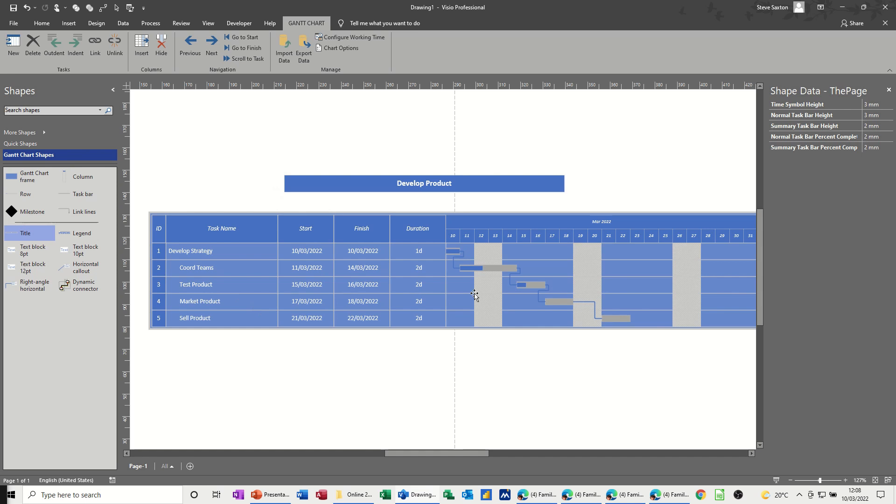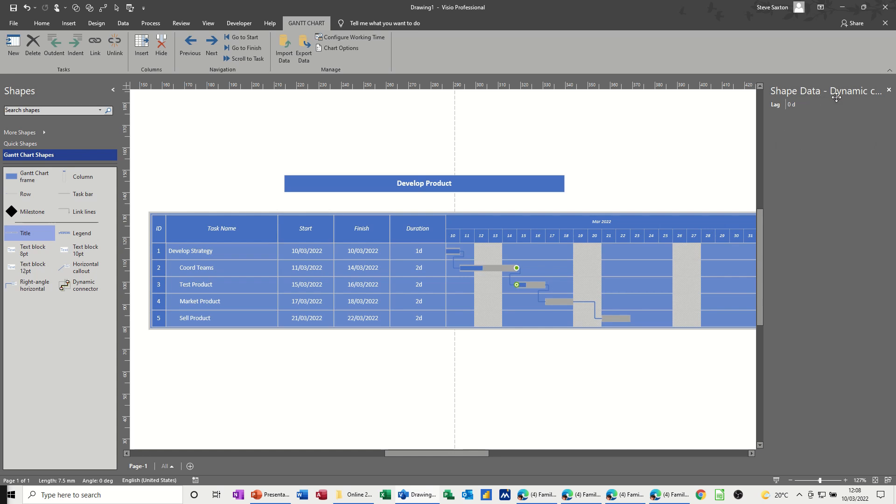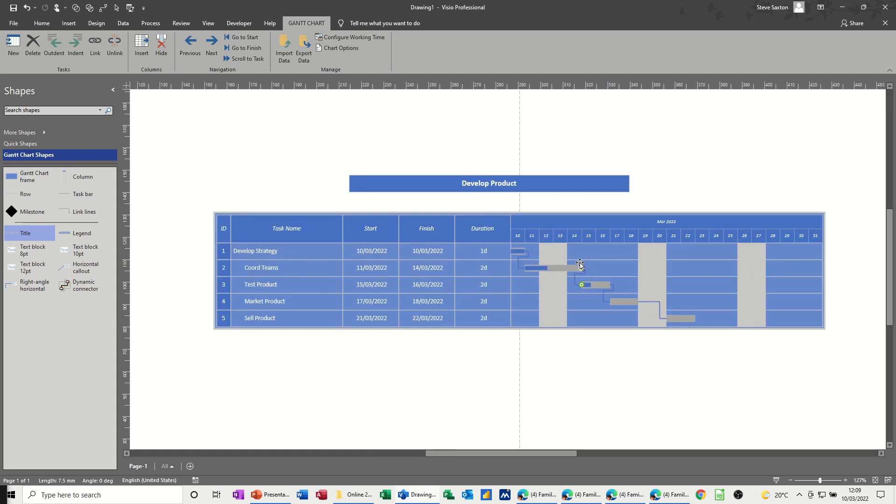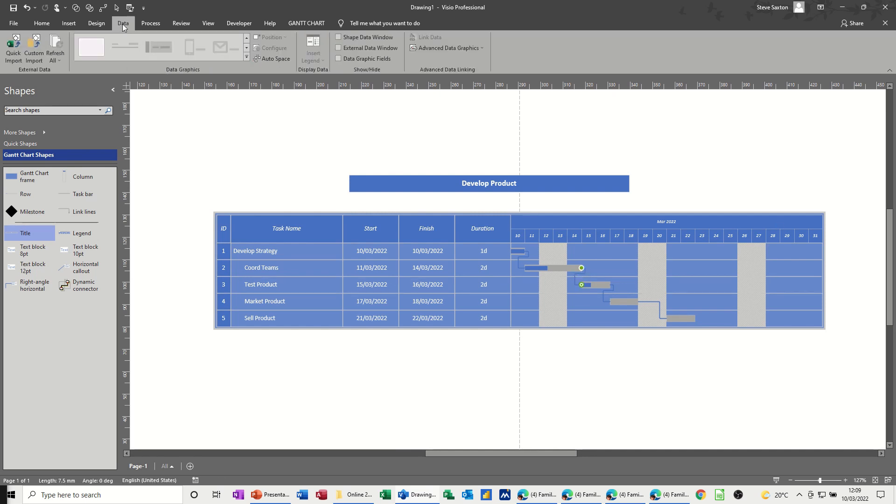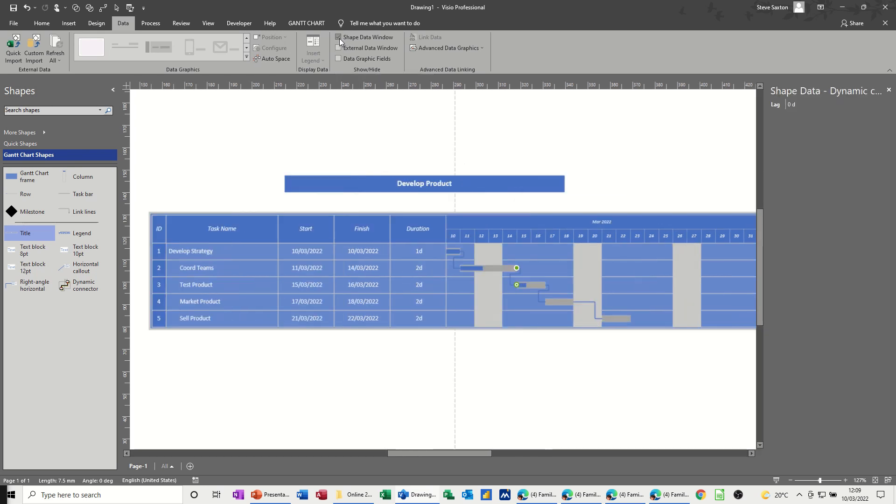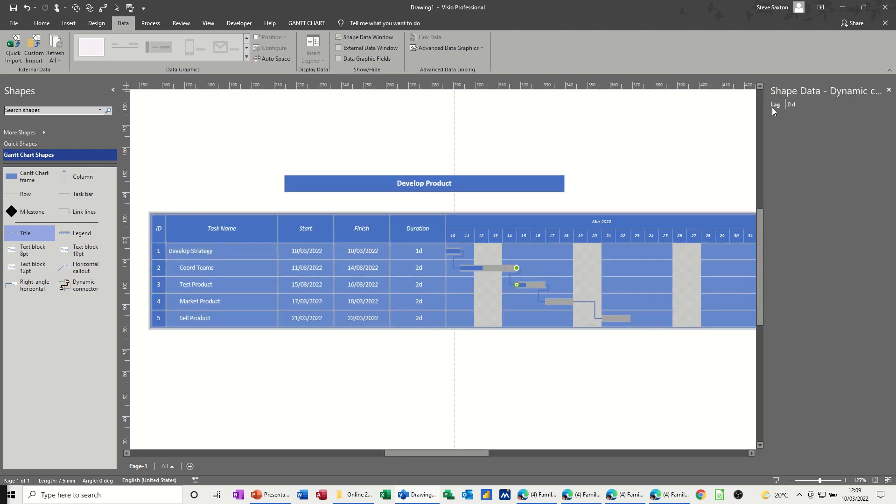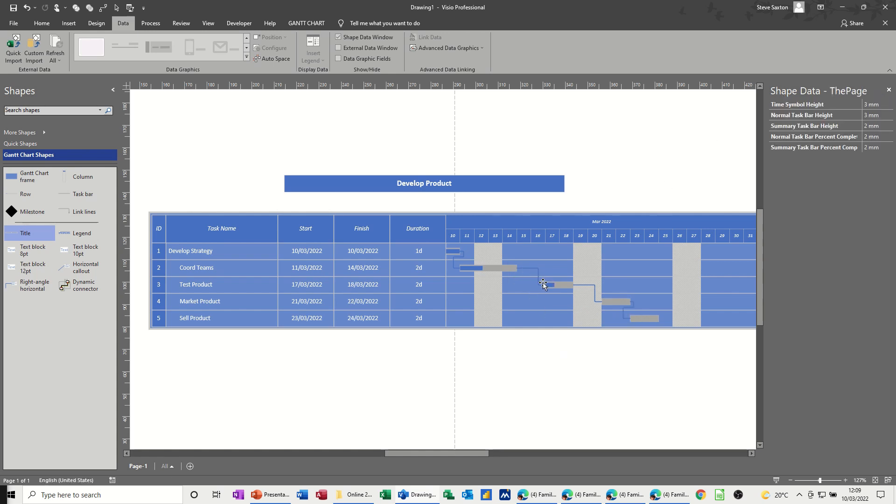Now if you click onto the lines, you might want to do this, if I click onto the line, the shape data, so if you haven't got shape data active, if I click onto the line, the shape data window's not there. Click on the data tab, and then shape data window, so it comes up. You've got this option for lag. Now if I put a two day 2D lag, let's see what happens there, see it gives you the two day lag there.